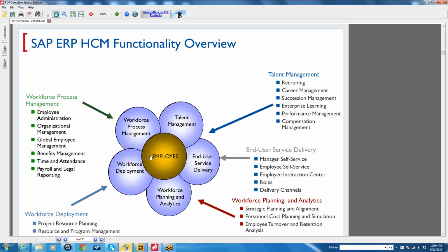If they are implementing a new project, they look at the current employees' workloads and the gaps they have, and they identify the resources. If they see a resource gap, or some of the resources are not available to perform that work, then there is a gap. They will try to fill that gap by bringing people from the outside.